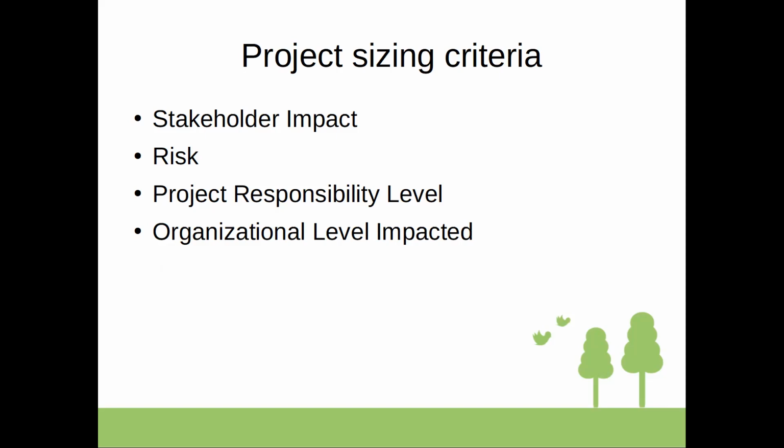The human resources that are engaged potentially include resources like money spent on tooling that might be used. Let's say, if it's an example in IT, a data center launch, you need to include material costs. How much is spent on renting, let's say, a data center, purchasing equipment. Basically, you don't include just salaries, you don't include costs for the people only, you include costs for everything spent on the project. Infrastructure, any external services, anything like that.